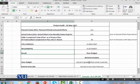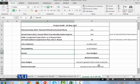Because over budget is, what we have earned and what we have spent is greater than available effort. And behind schedule is that earned value is less than planned. We have planned and the earned value is less than planned.